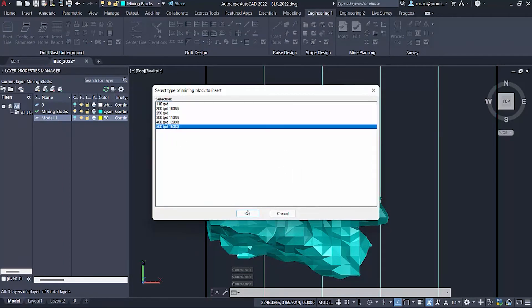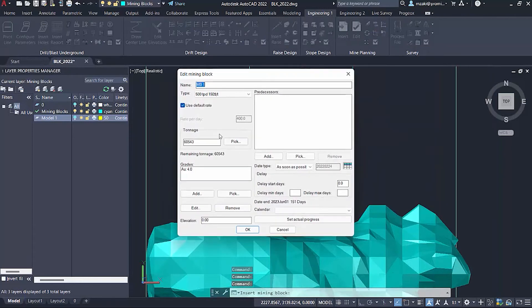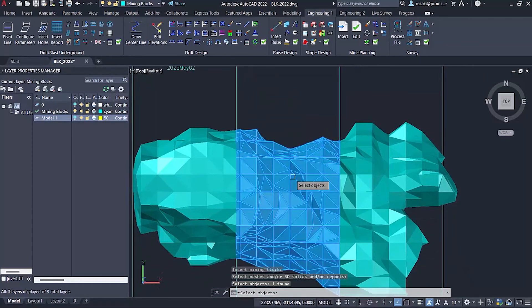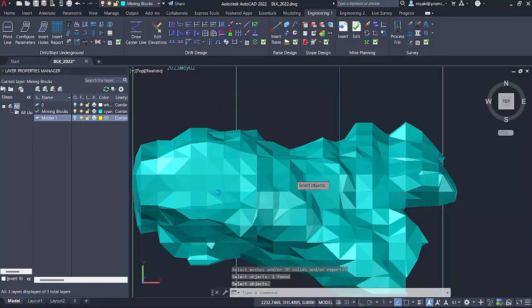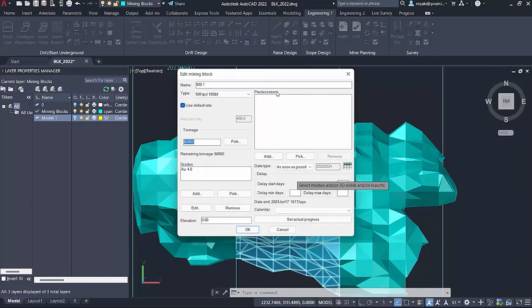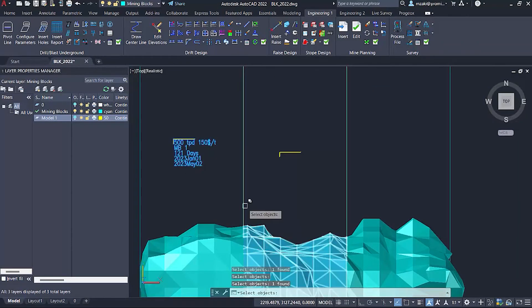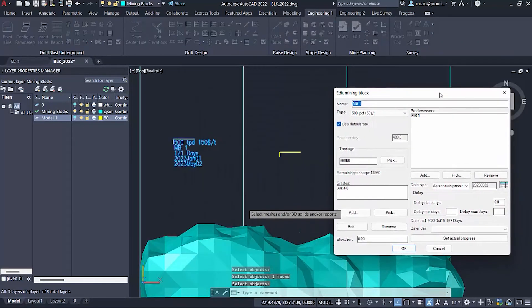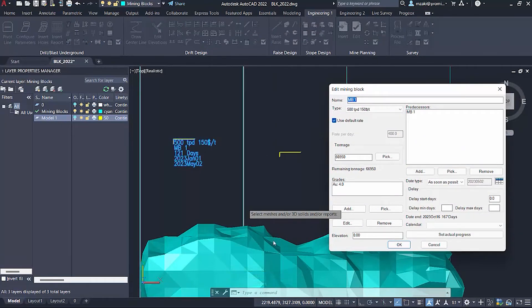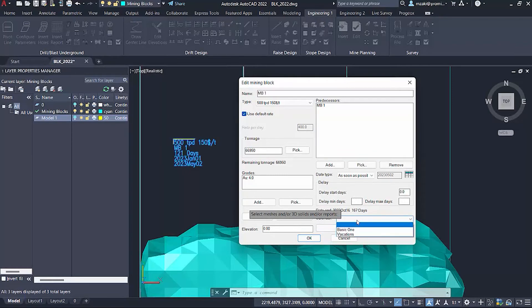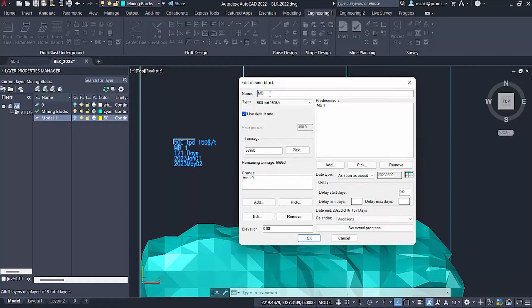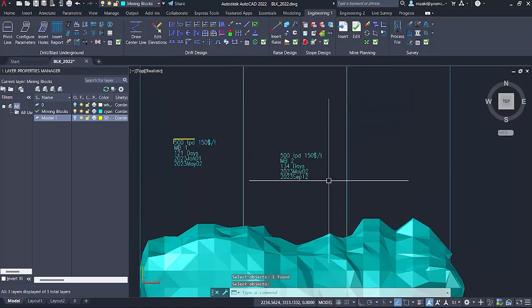Again, select 500 tons per day, pick the tonnage, pick the volume, apply a density, hit OK and we'll get the tonnage. Now for the predecessors, we want to say pick and then pick our first mining block. We're telling the program that we want to start the second mining block piece after the first one. So our predecessor is mining block one. We will not apply any delays, the calendar will be vacations and hit OK. I forgot to change the name to mining block two.